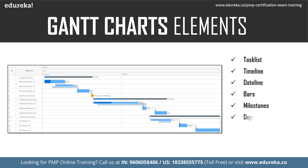Dependencies are also represented — relationships established between one task and another. Unless the predecessor activity completes, the successor activity cannot start. Dependency types include finish-to-start, start-to-finish, finish-to-finish, and start-to-start. Such representations help us understand the dependencies. As mentioned, between phase 1 and phase 2 there is a lead, and the condition to have that lead is also a dependency which can be explained. Progress — how the project is progressing, whether it is as per schedule, ahead of schedule, or behind schedule — is also clearly visible using the Gantt chart.